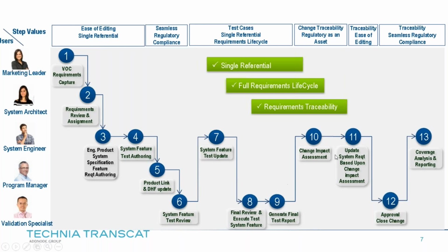If not, it will be an iteration loop. And of course, there could be several iteration loops. At some point in time, the systems engineer will review a subsystem, determine change impact, and determine the results of verification. And go ahead with the validation, approve the change, and close the change order for that change. So that's rather typical scenario.